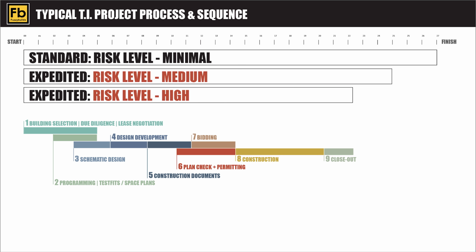This means it will include all the components related to fire life safety the city is looking for, but will most likely be missing design aesthetic elements that the city doesn't care about. Having your architect do this may cost you more because now they're generating two sets of drawings, one for plan check, one for bid. This also means your architect and consultants have to be very coordinated.